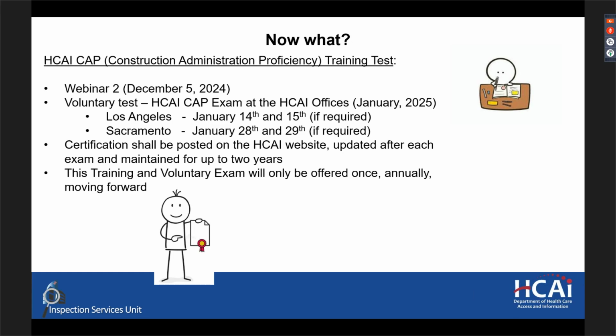So the approved construction document set is a mix and match, basically, between the original approved drawings, ACDs, and NMAs. Whatever is part of this needs to be on site. It needs to be all put together on site, or, like you are saying, electronically, but available on site, of course.